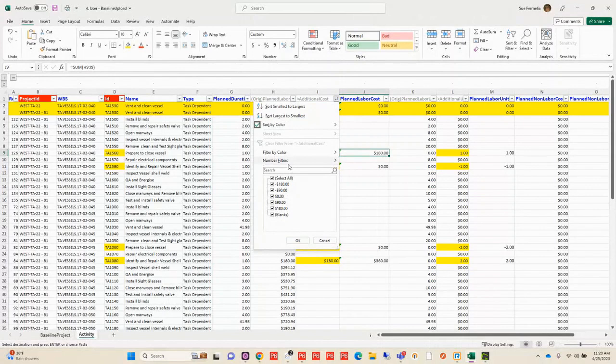So I can say I have my project ID, my activity ID, my name, the status, a % complete, an actual start and finish, a planned start and finish, and a suspend and resume if I need it. Now, when I look at my user-defined fields, I actually need none of those. So I don't have any in my area or my UDF columns here. So I'm not going to pull out any user-defined fields, nor am I going to pull out any of my codes.